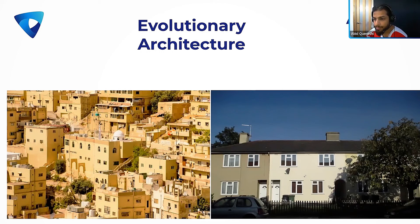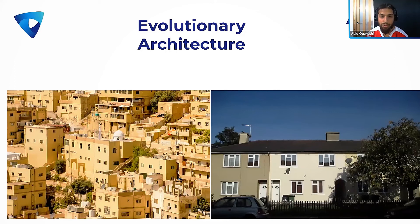Is sprint planning different from release planning? Yes. In Scrum, release planning is decoupled from sprint planning. Sprint planning is about how much work and what problem to solve in the next sprint. Whether you release is the product owner's decision — some product owners release several times a sprint, some every day, and some have a releasable product every sprint but decide not to release until after three sprints. The sprint planning and release cycle are completely decoupled.